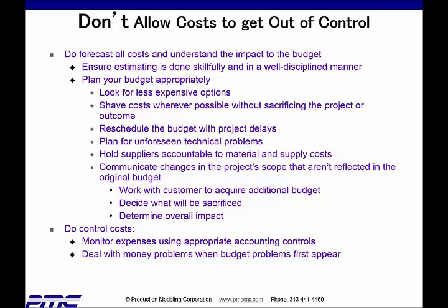Communicate changes in the project scope that aren't reflected in the original budget. You need to work with the customer to acquire additional budget. You need to decide what will be sacrificed. You need to determine the overall impact. You need to control your costs. Monitor expenses using the appropriate accounting controls. Deal with money problems when the problem first appears. Don't wait.